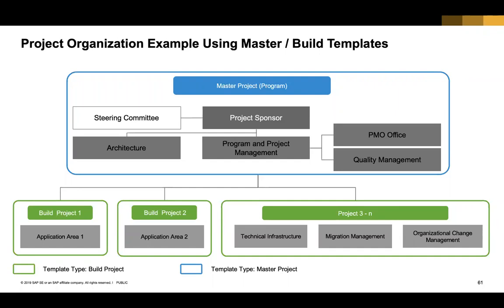And to start with Focus Build, you need one master project and one build project. There are multiple ways to configure this. You will learn that in the configuration guide. And more often than not, we see a master project and a build project concept being used by most of our customers. And each of the projects will have its own timeline. Each of the projects will have its own phases and milestones and so on. And it's like any other project plan that you would have.